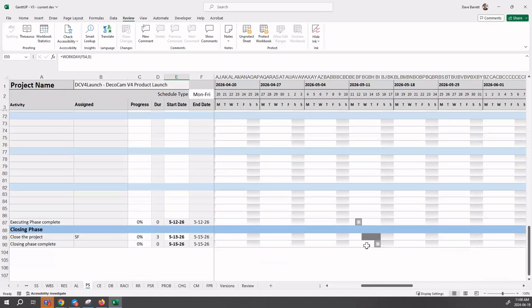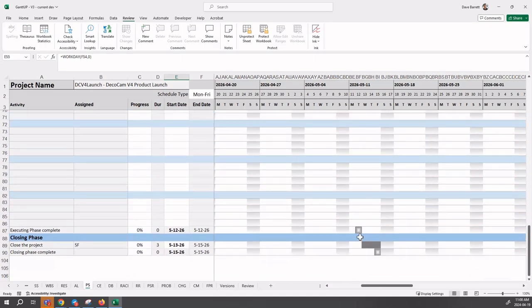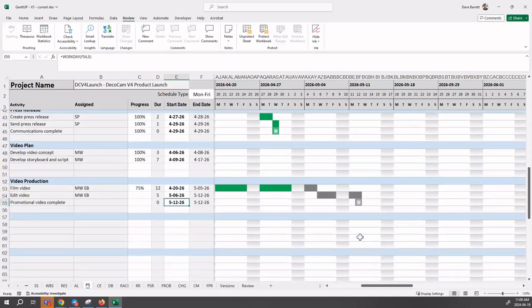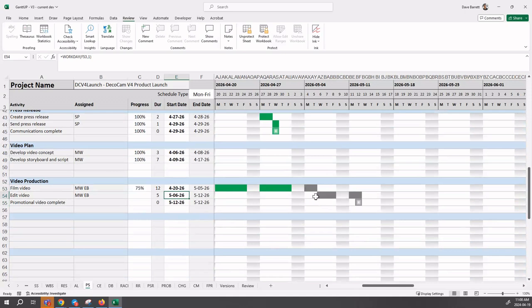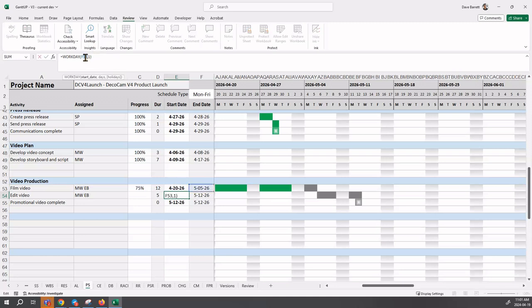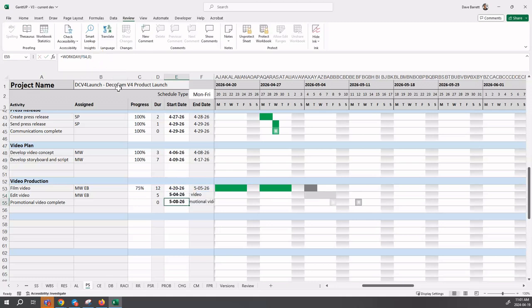Instead of completing on Wednesday May 13th as we previously planned, we're now going to be completing on Friday May 15th. We've got a bit of an issue here. In discussion with the team, what is decided is to overlap these two activities. We do that by updating the dependency information to create a lead. Instead of a plus one, we're going to enter a minus one into the workday formula.